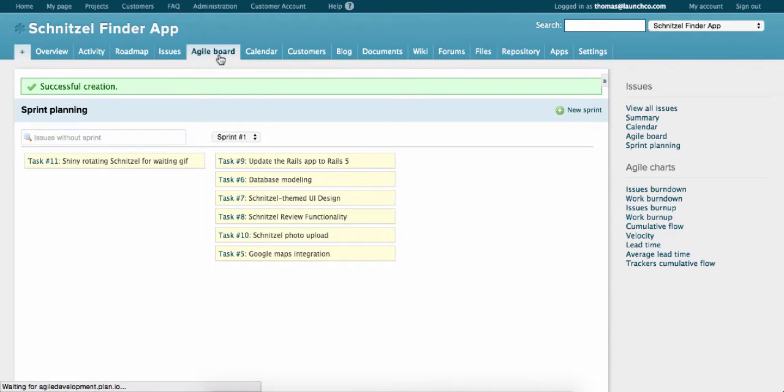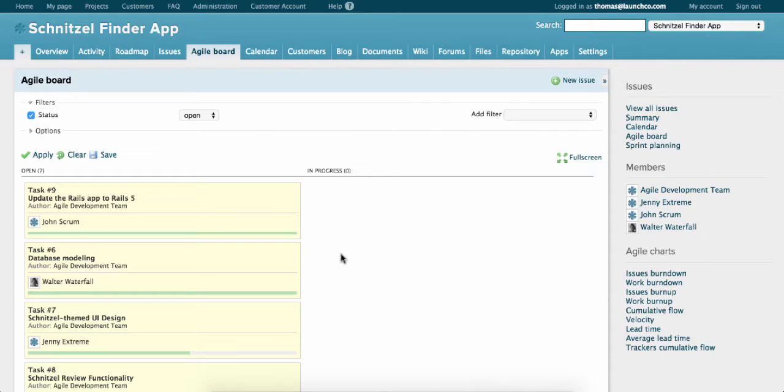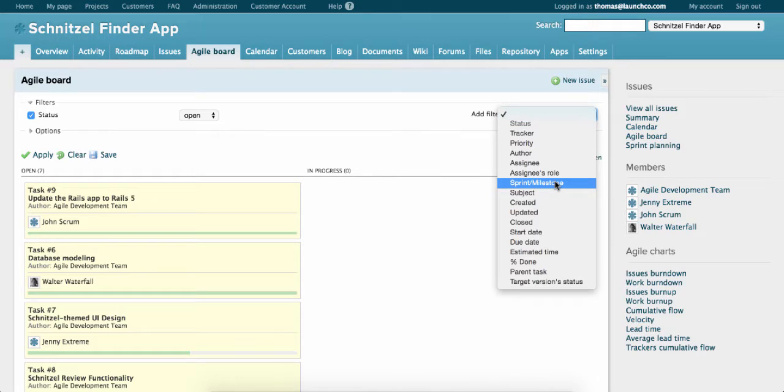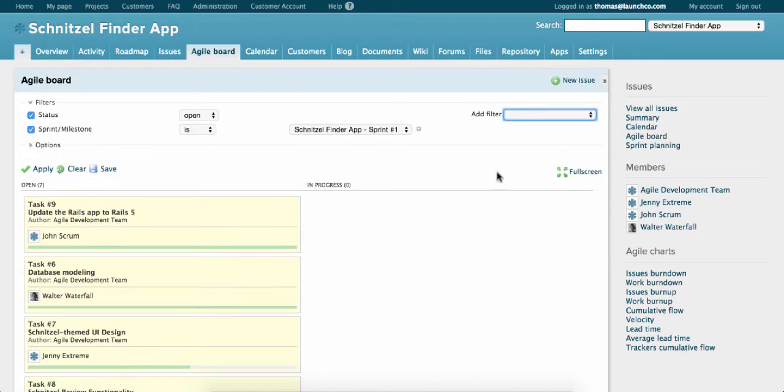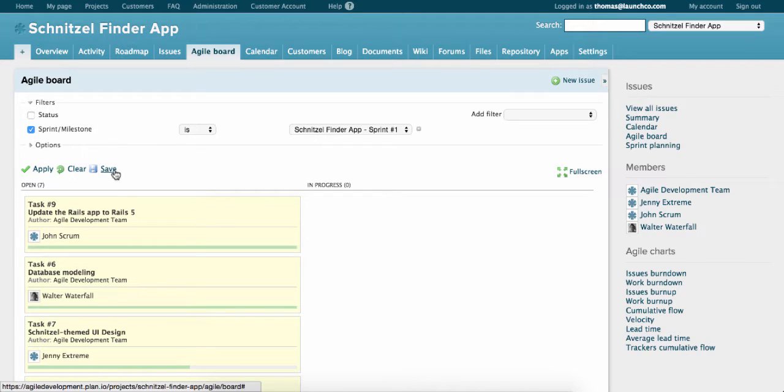Click on the Agile board in the navigation and by default you'll see all the issues in the project rather than the issues for the current sprint. So let's change that by adding a filter. Click on Add Filter. Select Sprint Milestone. Deselect Status. And make sure this Sprint Milestone is set to the current sprint. Click on Save.